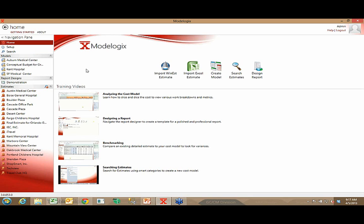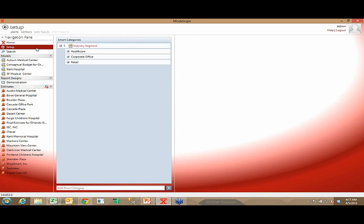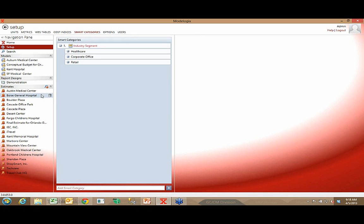When I show Modelogic to people, there are a couple of setup options I like to review quickly because they lay the foundation for the entire system. If I click on Setup, first and foremost — and this is a critical administrative piece of Modelogic — when I bring projects into the backend database along with all the costs behind those projects, that's not enough. I also want to apply certain key attributes to each project so those projects become highly searchable.